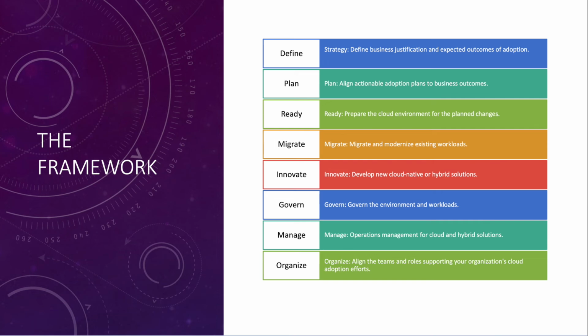Right? If we say we're going to save 90% of CapEx, make sure you include how much OpEx you're going to be burning in addition to this, right? So make sure that you've got trackable things along the way. If you say you're going to increase your CapEx by 20%, make sure you can track that when you're setting up your dashboards. And if you're really burning 25 or 30 or 40 or 50%, okay, that's not meeting my strategy. We were supposed to save money by doing this, and then go back and figure out where are you not being effective, or was your basic idea of the justification of saving money really not realistic, right? We tend to be optimistic when we're working on strategy. We want everything to work out perfectly.